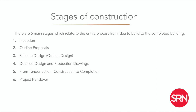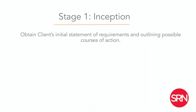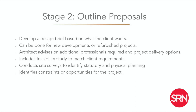The first stage is inception, which involves obtaining what the client wants — a statement of requirements and what they want to achieve, such as building a residential house. From there, we move into outline proposals, where we look at the client's requirements and come up with a brief. This brief states the objectives: what does the client want, what quality of building, what is the scope of services, and are there options of refurbishing an existing house or doing a completely new build? This helps advise on the professionals required.